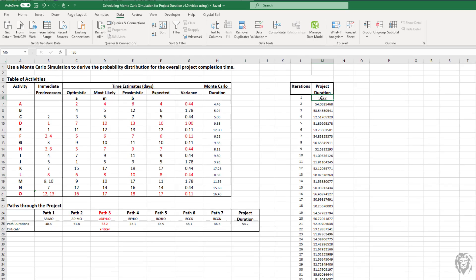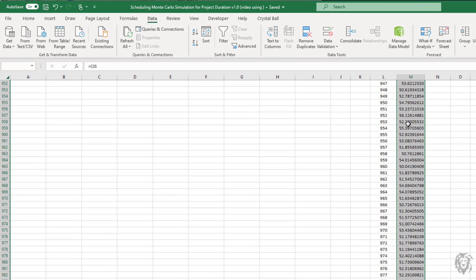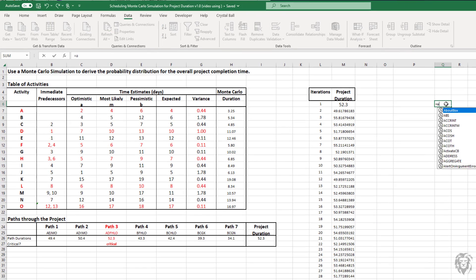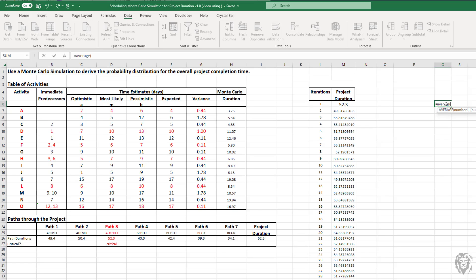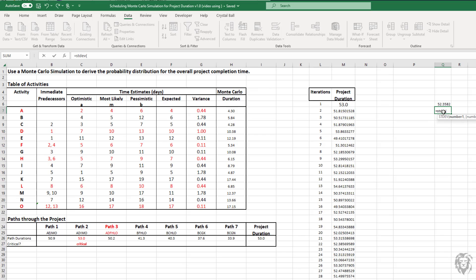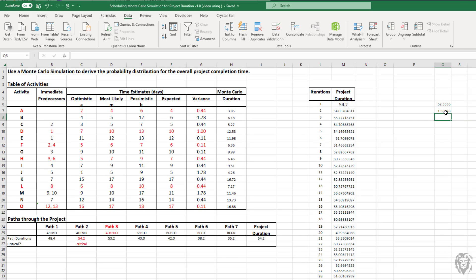I'm just going to choose all of my durations, and I'm going to go up to the name box, and I'm going to call them durations. That's just going to make it easier. For example, if I want to know what the average of the durations are, we can just put that in. If I want to get the standard deviation, same thing. We can go ahead and look at probabilities of them happening above or below a certain amount. I'm going to integrate that all into the next prettied-up spreadsheet that makes this really reusable with very little effort.